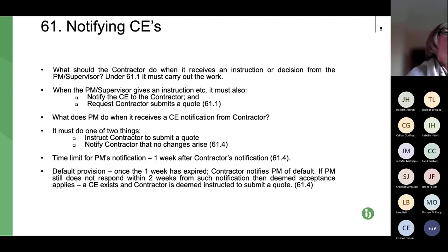and very often the contractor is busy actually physically doing the work, so hasn't actually got the time to devote to an adjudication. So what the contractor wants to be doing is keeping the discussions going with the project manager and keeping the process moving. So the project manager makes an assessment, it's substantially less than the contractor's quote. The contractor doesn't think it's realistic at all. Again, the contractor needs to be speaking to the PM, writing, explaining why it's not sufficient and seeing if a negotiated increase can be achieved, and/or a negotiated agreement for that particular CE.